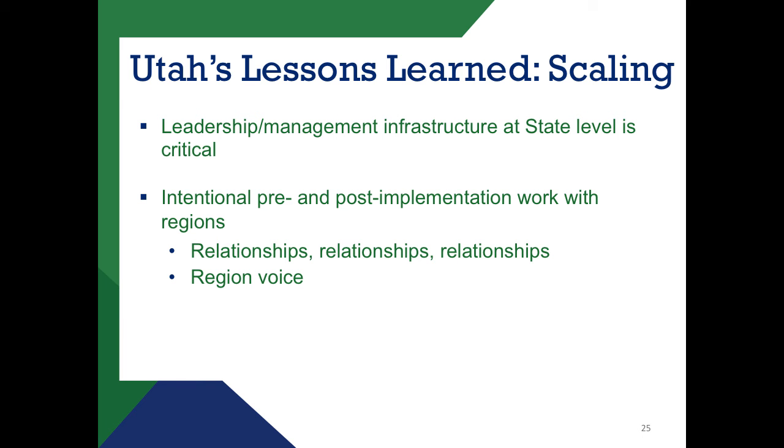The second area, and I would say this is actually the thing we've gotten the most positive response about, was what I would call our intentional pre- and post-implementation work with the regions. One of the things that we did is we created a small core team, we call it the Homeworks team, that has worked directly with region administrative teams. And we created a process for pre-implementation work with them for a period of about 9 months before we ever started training in any region. And this really led to buy-in and development of relationships with the regions.